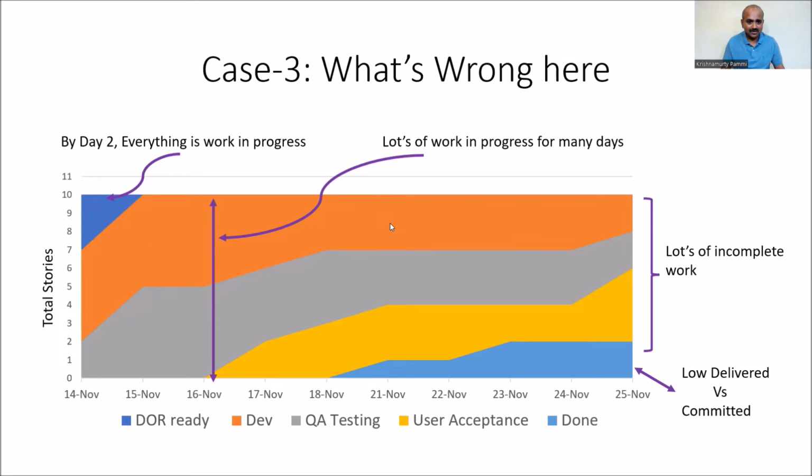It is just moving on, right? And then you start delivering to UAT slowly, and believe me, whatever is deployed is this much work. You committed for this much work. You made several starts. That means instead of taking things to closure, instead of making user stories finish, you started all the user stories very early in the game.